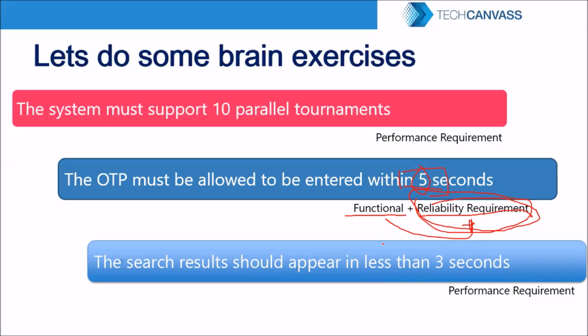Right? So then what will you do? You can't simply take every requirement as it is. So there are certain approaches which need to be taken. There is something called proof of concept. You might not have to do it, but as a business analyst, you need to coordinate that. Let's say for example something is coming up which you feel may not be feasible. What you will do internally is quickly ask your tech team to do a POC, which is called proof of concept. They will quickly write some piece of code to validate whether this is feasible or not. If it is not feasible, you need to now find a different way to put this. Getting it? Yes.